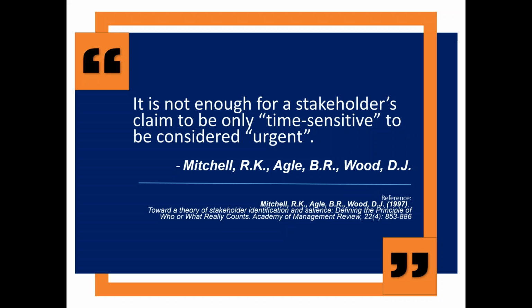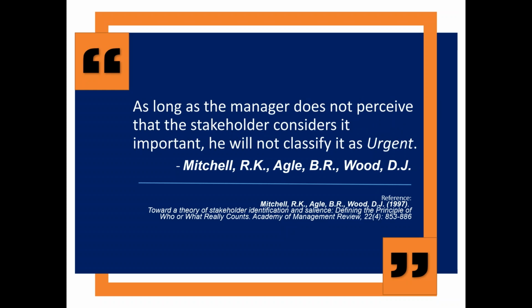I'll repeat that. It is not enough for a stakeholder to claim to be only time sensitive to be considered urgent, but the other factor is the criticality. As long as the manager does not perceive that the stakeholder considers it important, he will not classify it as urgent. That is the point.